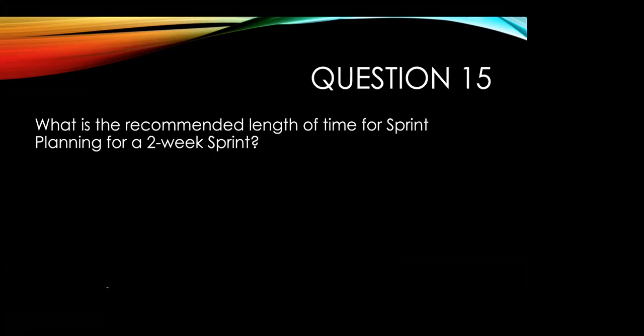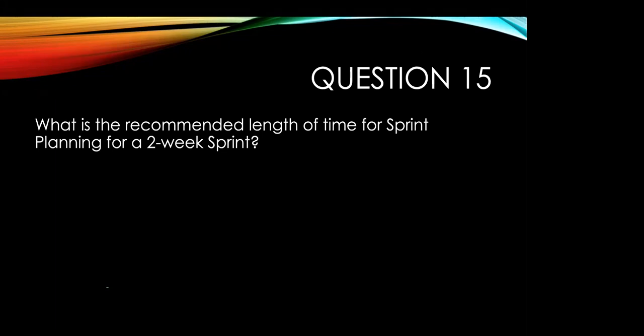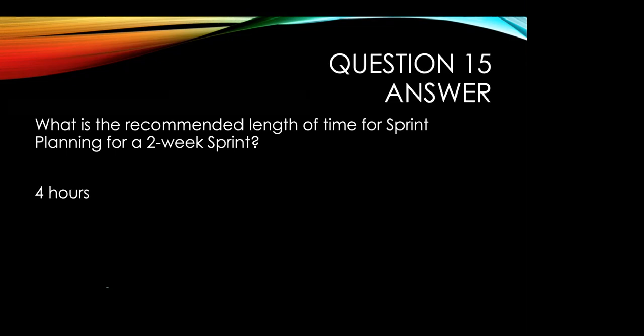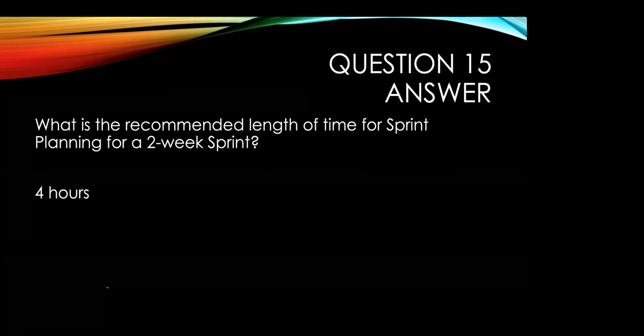David Friedman. David, great. What is the recommended length of time of sprint planning for a 2-week sprint? How long should you do sprint planning for a 2-week sprint? And it's the same in almost all Scrum Guides, except the current one. They don't mention it. We have answers. Excellent. 4 hours. Again, David Friedman. Excellent.